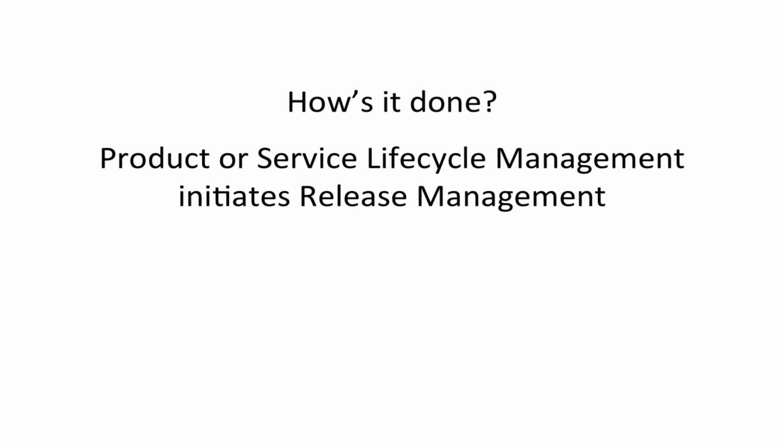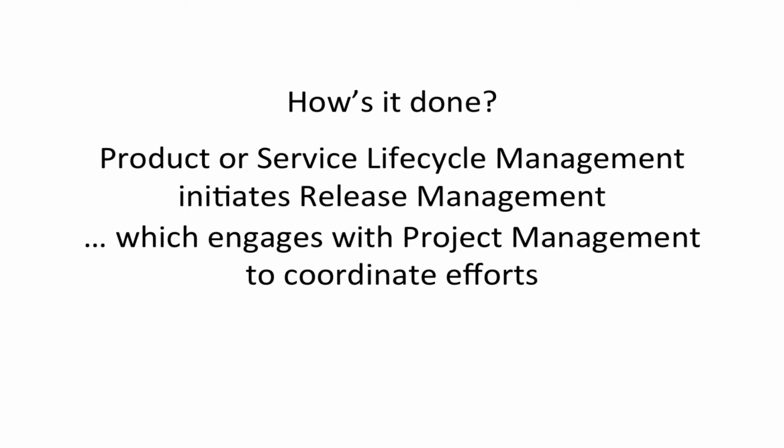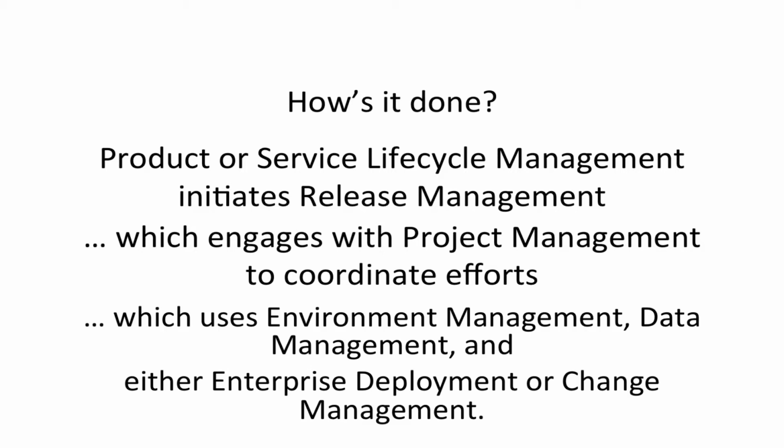So how's it done? Product or service lifecycle management initiates release management, again with the output of a service design package. Once release starts, it engages with project management to coordinate efforts. Project management, in turn, is going to work with other processes in your environment, such as environment management, data management, and then to deploy, it's either going to use enterprise deployment to move through multiple pre-production environments, or directly to change management to go directly to configuration items.